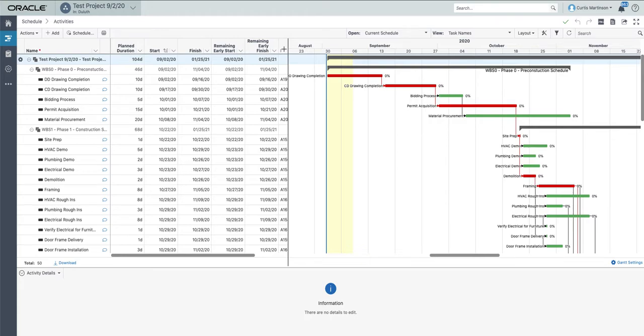Today we are going to talk a little bit about how to use the scenarios tool. In the past we have talked about the baseline tool, and the baseline tool and the scenario tool are very similar in the way that you create and utilize them. The only difference is the scenarios are a workable timeline where the baselines are more of just a picture. So I'm going to show you how to make one. I'll show you the differences between the two.